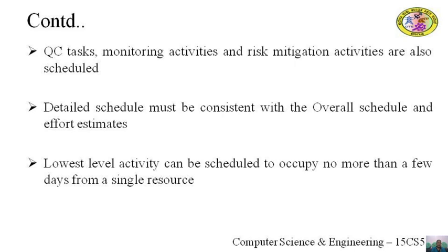If this detailed schedule is not consistent with the overall schedule and effort estimates, the detailed schedule must be changed. If it is found that the best detailed schedule cannot match the milestone effort and schedule, then the earlier estimates must be revised. Thus, scheduling is an iterative process.